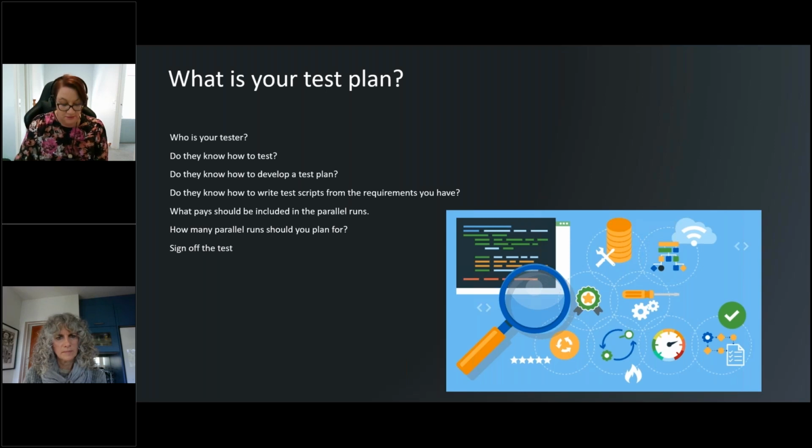Now, what we recommend from a testing process is that there is a user acceptance part of the project where people are going through and doing unit testing. So testing rules one by one as opposed to end to end, and just checking that things work the way you expect them to. So if I apply for leave, does that go to the correct manager for approval, and does it flow through the way it's supposed to? Generally, the UAT testing is completed by subject matter experts. They're the best people to pick up if something's not quite right.